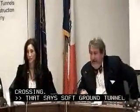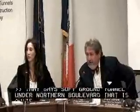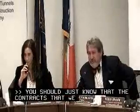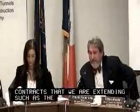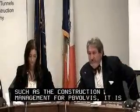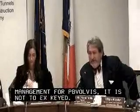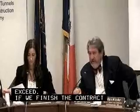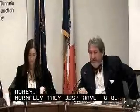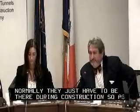Right. And also, you should just know that the contracts that we are extending, such as the construction management for PB Bovis, it is a not to exceed. That means if we finish the contract earlier, we will spend less money. Because normally construction people in the field, they just have to be there during construction. So as we complete projects faster, we can pull people out faster.